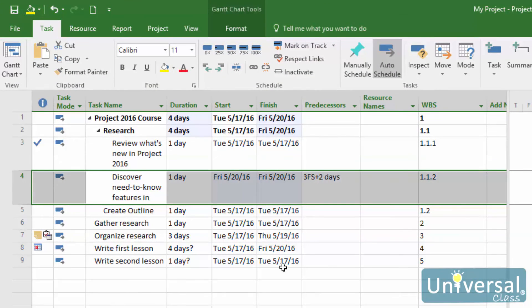Linking tasks is defined as establishing a connection between tasks in separate schedules so that task changes in the first schedule are reflected in the second. It is also used to establish dependencies between project tasks. In this section, we're going to learn how to link to external tasks, such as those within another project. When you insert a hyperlink into your project, you create a task that can represent the timing and/or costs of another project or subproject in your plan.